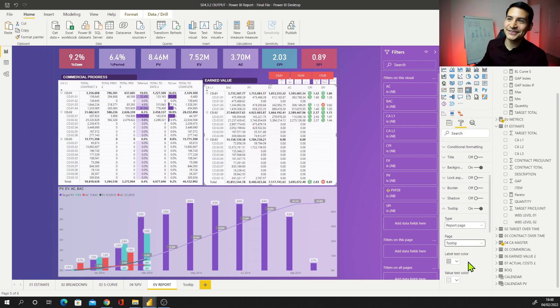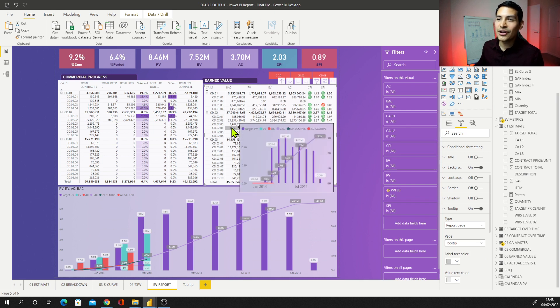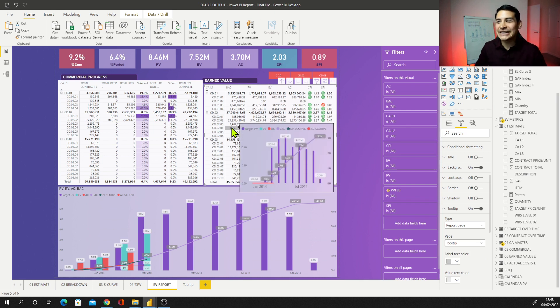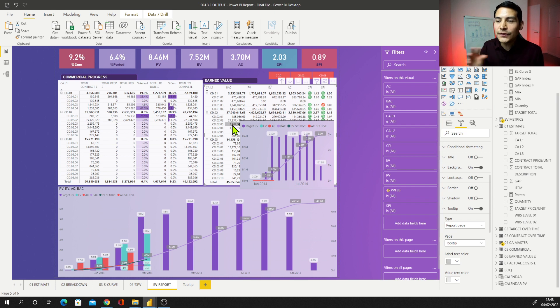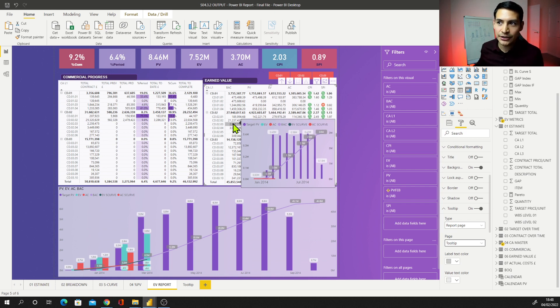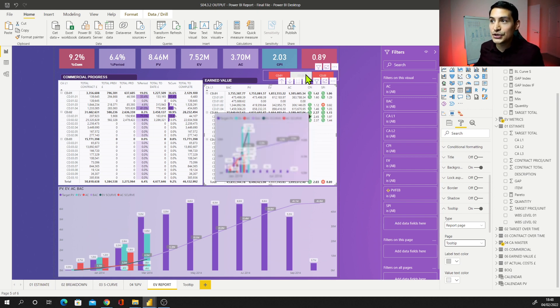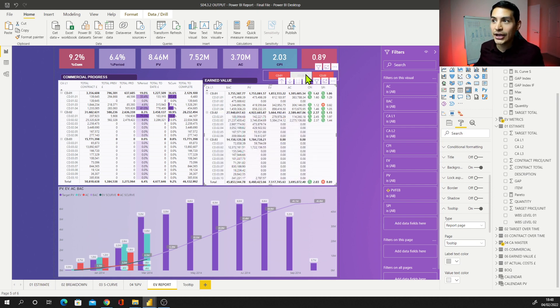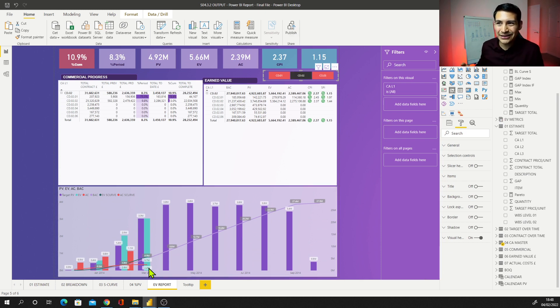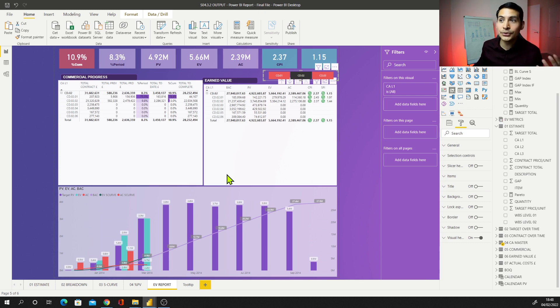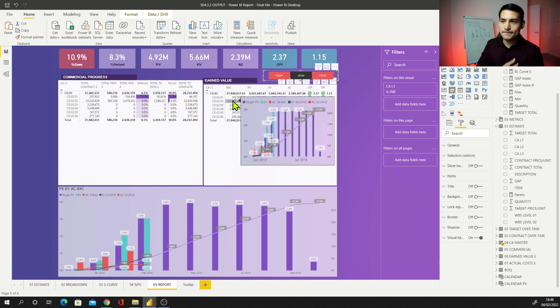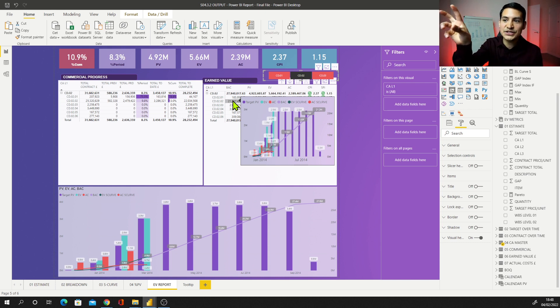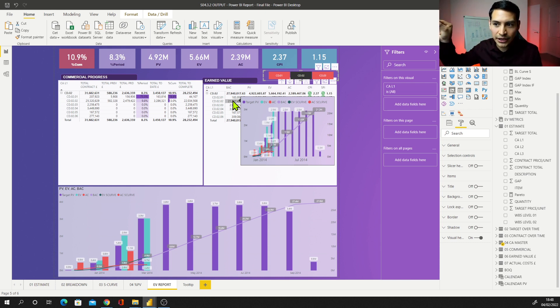Now I can display that correctly. So if you go here to each of these slides, what you're going to find, bam! You're going to have your tooltip as a pop-up window that's going to show you the S-curve, individual S-curve filtered out for each of the control accounts you are checking on your table. So if someone in your team wants to say, oh, you know what, it's cool that I can check the control account number two level with the S-curve here. But actually, I'm the manager of the control account 2.2 and now if you give that, you can go here and you can show that on the fly, you can show that specific S-curve just filtering out all the data for that control account. So what a beauty.